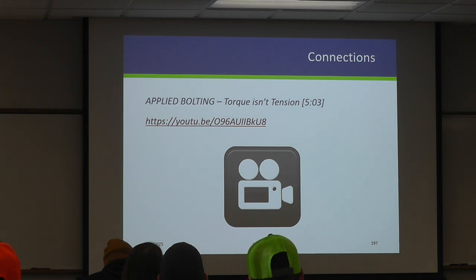The other piece of it is DTI frees up you as a resource to not be in the basket, right? Because if they're doing turn of the nut, folks are familiar with that, we'll go through it. You more or less have to observe them, otherwise you just have to trust their word. With a DTI, you can walk back to most of the stuff. But we'll go through some of that.